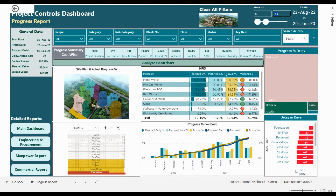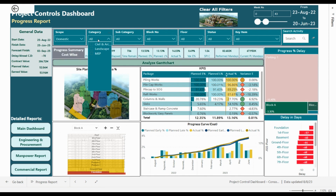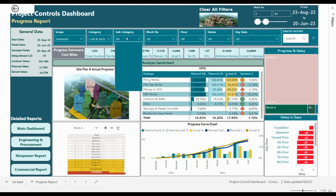The visual here is presenting the most delayed block — we have mostly Block A and Block F with the delays of each floor. In the middle we have information about the project: elapsed days, time remaining, and progress percentage. We can filter all this data by scope — domestic scope, prime cost, or provisional sum scope. Let's take domestic as an example.